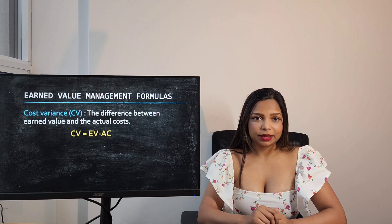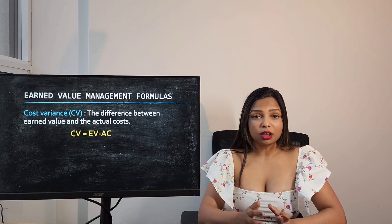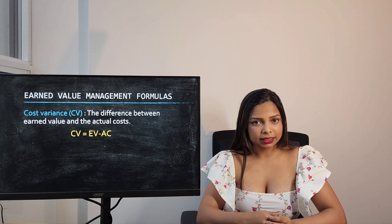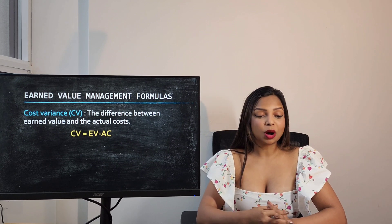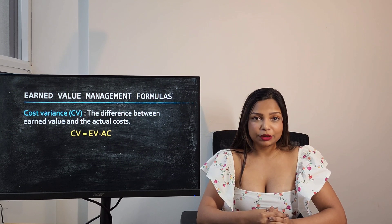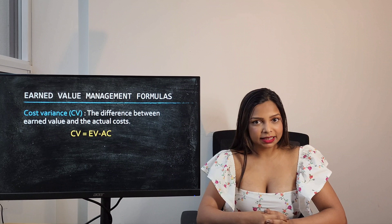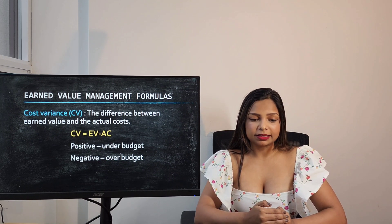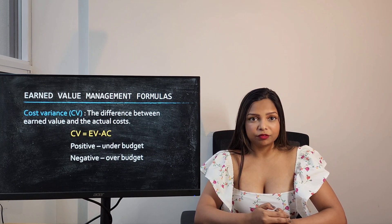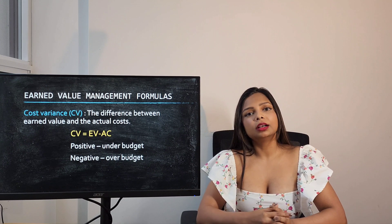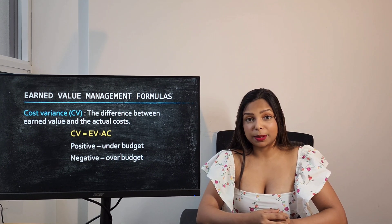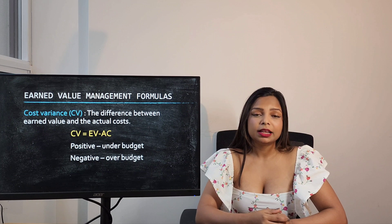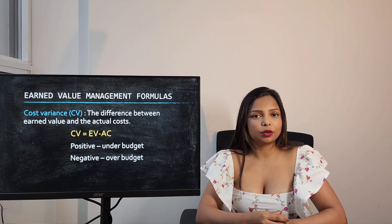Cost Variance is the difference between Earned Value and Actual Cost. The formula is EV minus AC. If Cost Variance is a positive number it means your project is under budget, but if the value is negative it means your project is over budget.